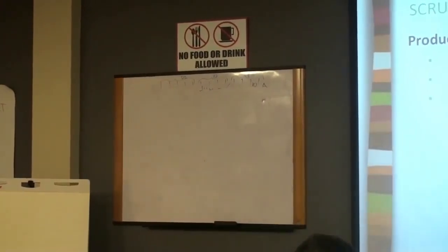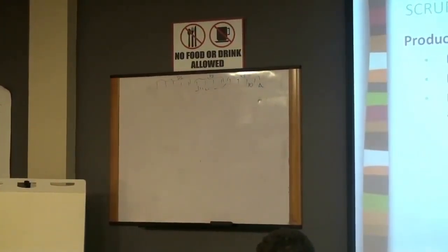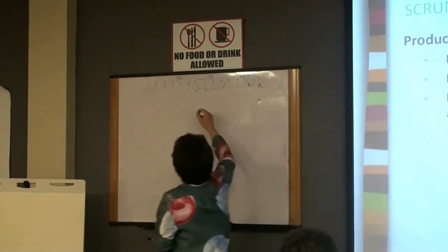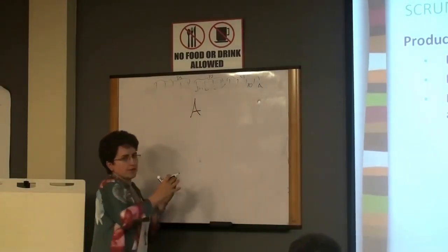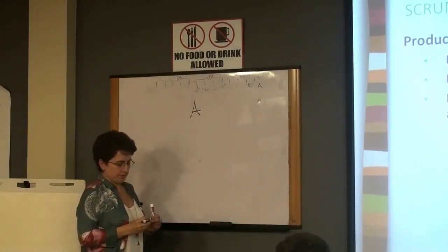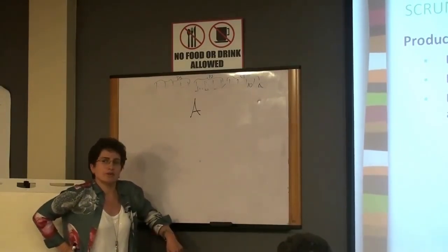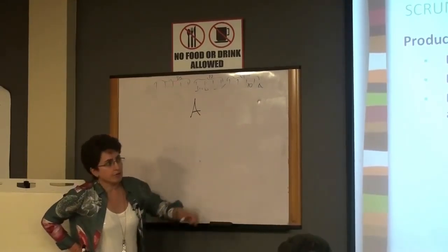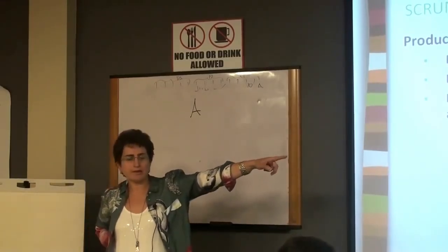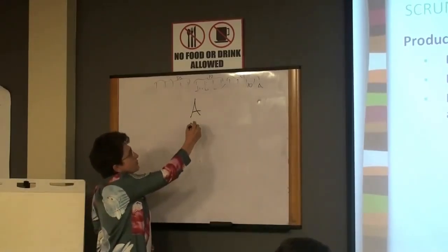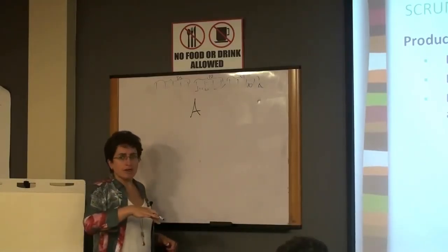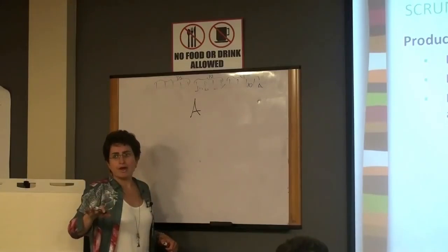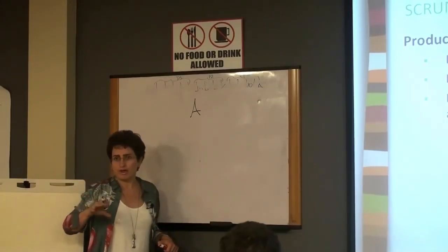So what you can do, let's say you have feature A, and this feature is a large one. And you sit there with development and think, will it take us like 2 weeks to develop and test? Or will it take us 3 weeks to develop and test? We have no clue. If you cannot even provide those bucketized estimates, what you do is break your feature down. Because any complex feature can always be broken into smaller tasks, right?